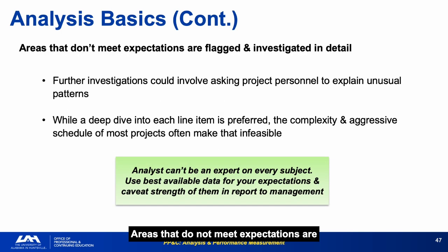Areas that do not meet expectations are flagged and investigated in detail, asking project personnel to explain unusual patterns, using best available data when deep dives are not feasible. Deep diving every line item is the ideal, but it is rarely achievable on complex programs with aggressive schedules. Pareto prioritization is how you focus your limited time.